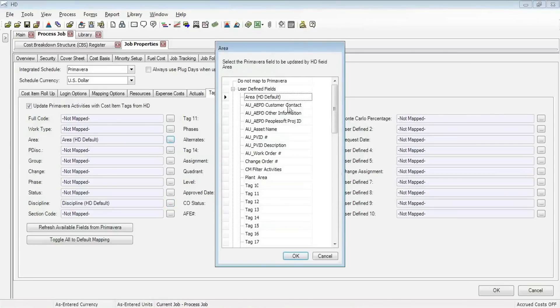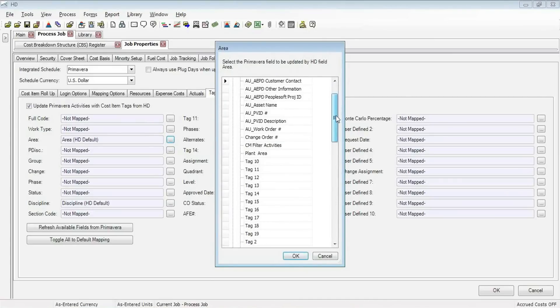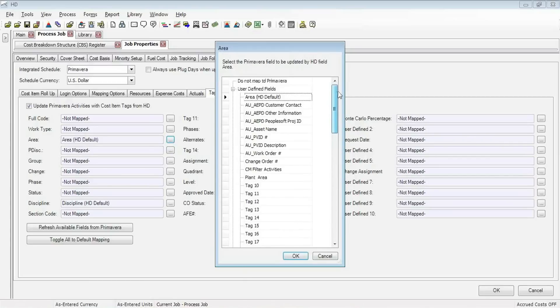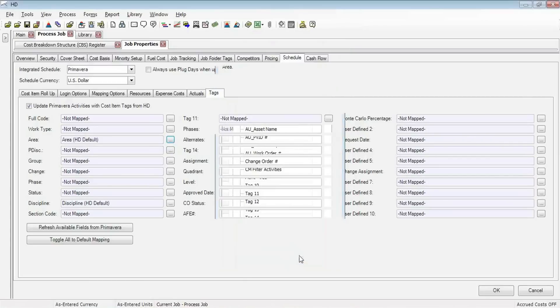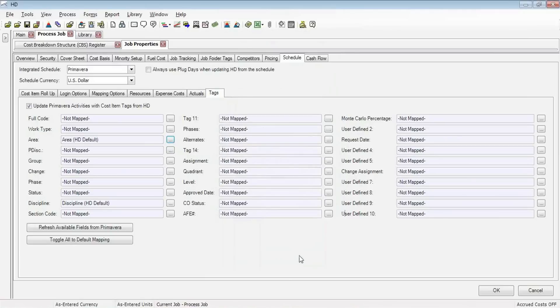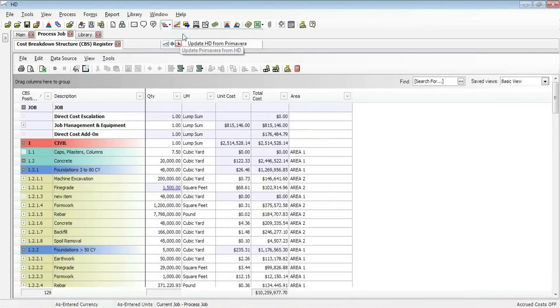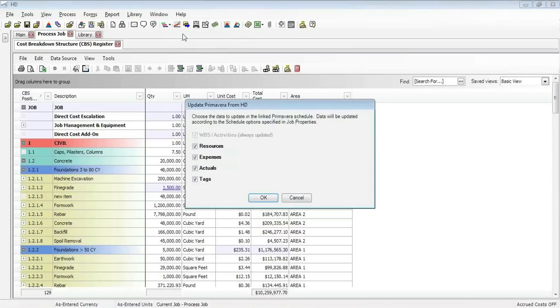If I pull up the Browse option here, you can select the Primavera field from the list of all of their activity codes and user-defined fields. We are going with that area default. So when I want to update Primavera with that information, I simply go back to my breakdown structure here and use my synchronization button to update Primavera from HD.